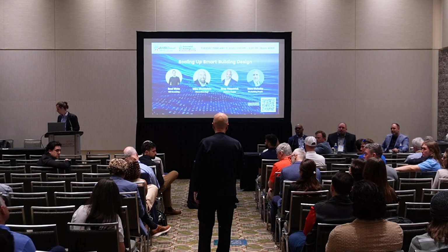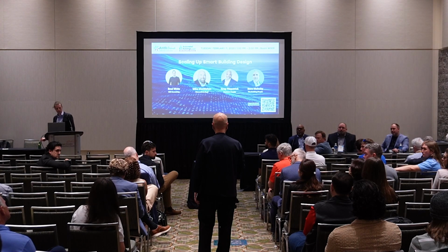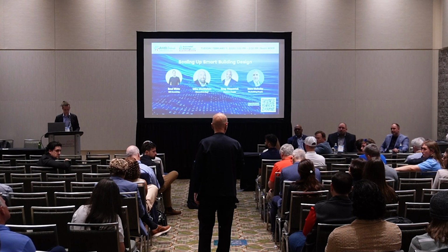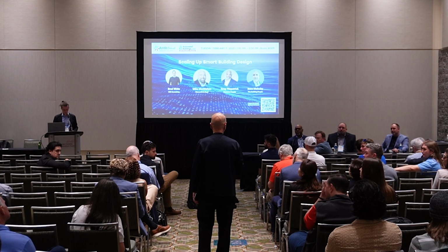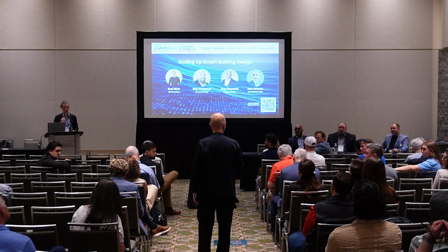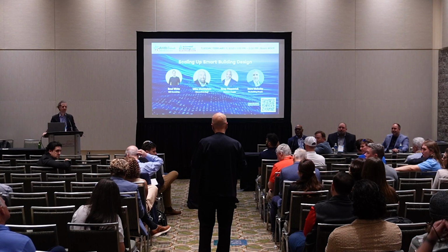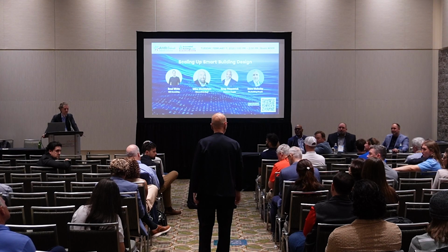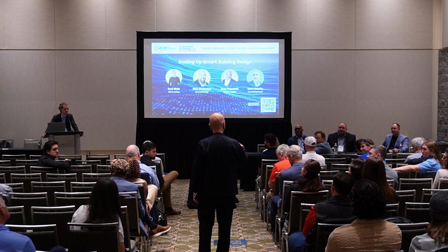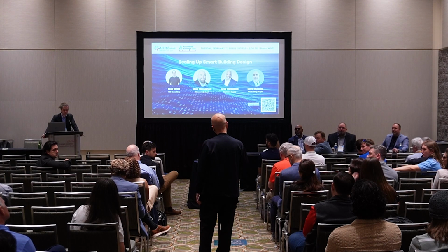There are a lot of great architects and engineers doing amazing things with BIM and digital twins, but almost every single delivery I've seen has come in a cardboard box. Here's a box of hard drives, here's a box of documents, and then the owner has to spend 6 to 18 months reverse engineering our work with other teams to understand what assets they have in the field.